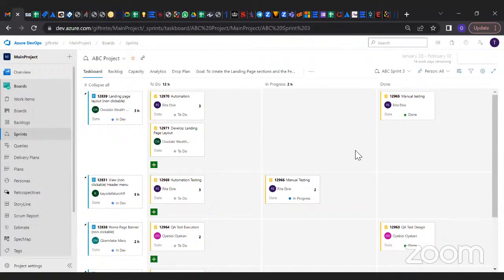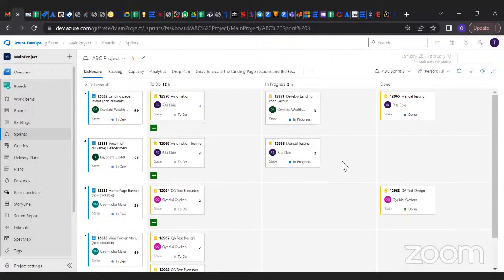Once I'm able to get all the updates, I will encourage everyone and thank everyone to keep up the good work and the hard work. They've been working so hard, so I try to encourage them and cheer them up. Once that is done, we close the meeting, saying we're meeting tomorrow, 10 a.m. Please drop any updates on the group chat, if there's anything we need to quickly jump on. Then we close the call and ensure that it's within 15 minutes. Yes, that's still a scrum.